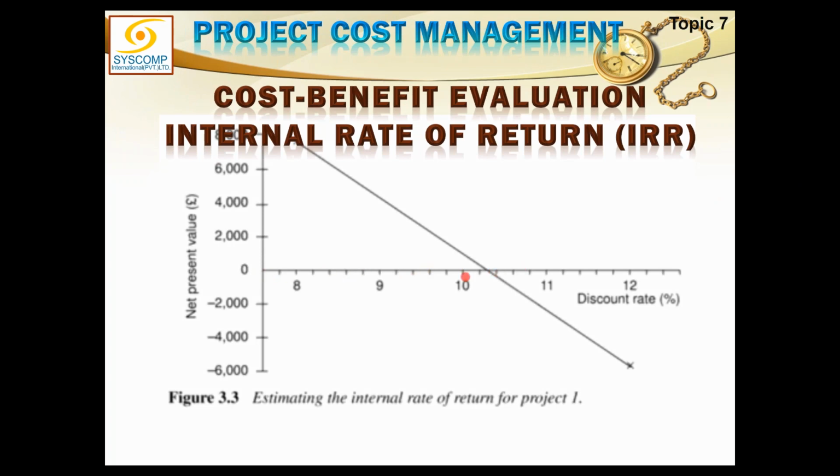Okay, so this is the percentage. We don't know what my IRR is, so from zero onwards, this is a percentage. If my value comes in positive, I will write 2, 4, 6, 8 and place it over this line, and if my value is negative, I place it under my line. For example, at 8%, it came out to be 8,000 plus, and at 12%, it came out to be minus 6,000.